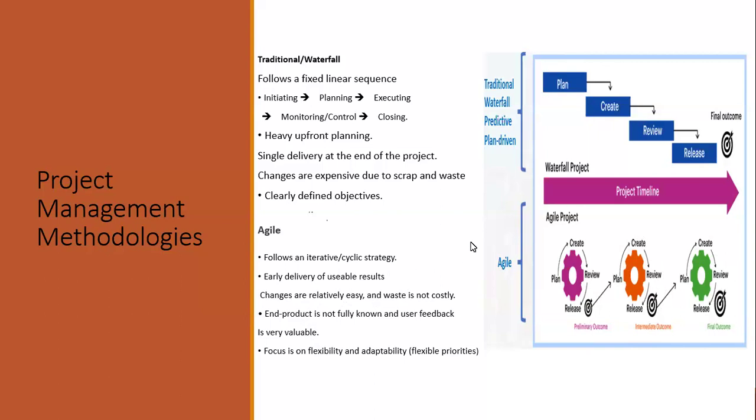Hybrid is simply talking about combining two methodologies in a project, right? So for instance, you want to build a drone project. A drone project requires hybrid in the sense that you have the agile aspect of it, and you have the waterfall. So what is the waterfall doing? The waterfall, when you have to build the physical components you can see, all those mechanical parts, assembling or designing of all those things, it has to do with waterfall.